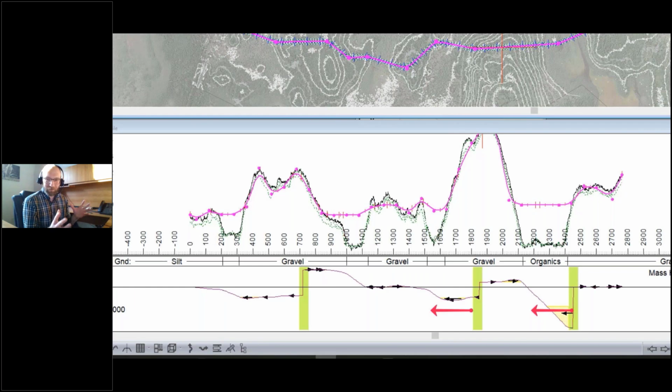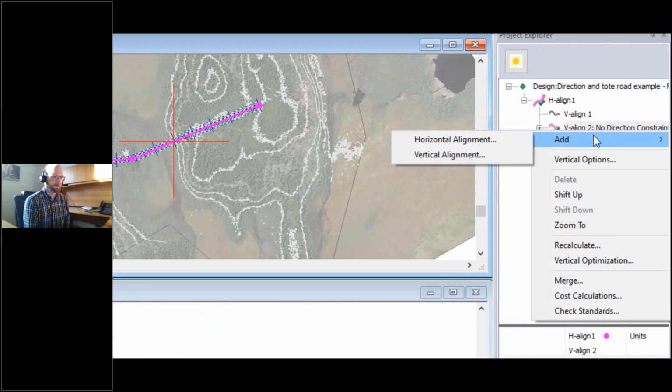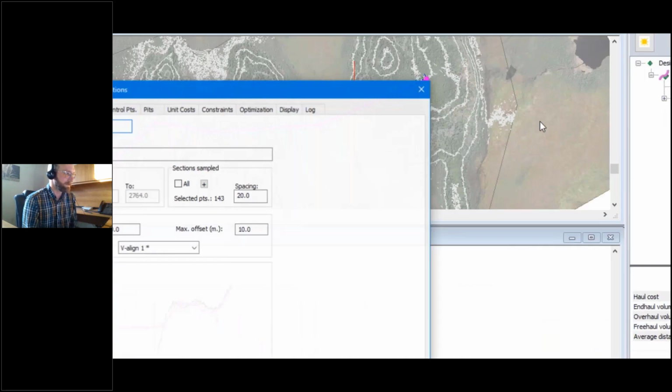So right now, what we have designed is the cheapest solution, but it's pretty deceiving because that cheapest solution isn't implementable. So in reality, when you go to do this, you're setting up your contractor to be under the gun. They think that they can move this X amount of material so far. It doesn't work. Maybe they are not making the best decisions and they try to just go for it. They'll try and walk equipment across, cause damage to the bog. Maybe they get stuck, which is going to cause more damage to the bog, but also have them there longer. Maybe they're fueling now in the bog to try and get out.